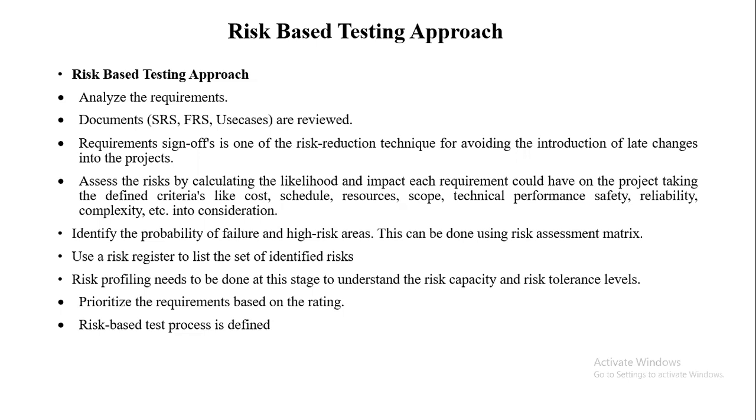After that, assess the risks by calculating the likelihood. Okay, so what is the likelihood, and what is the impact each requirement is going to have on the project. We need to identify and assess that. So how to assess the risk: based upon the cost, the schedule, the resources, and the scope. All these factors or criteria will be taken into consideration, and then we assess the risks.